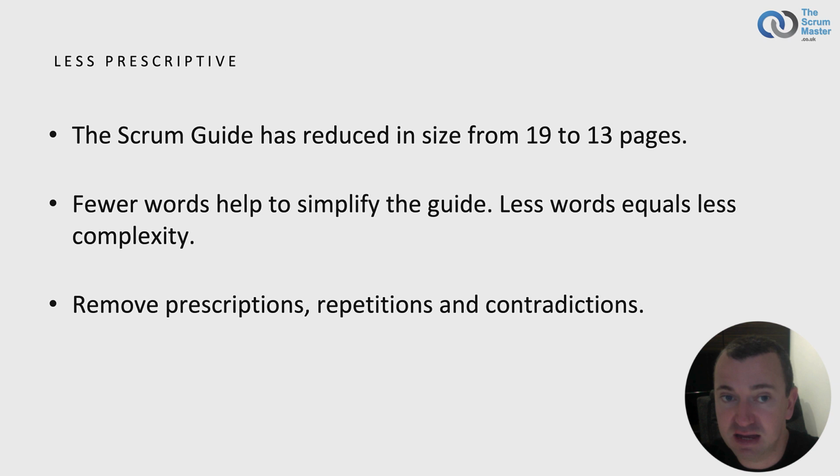For the product backlog, there are reduced details, including a shortened and less prescriptive description of product backlog refinement, and attributes of a product backlog are no longer mandated, as it's recognized they may vary due to context.